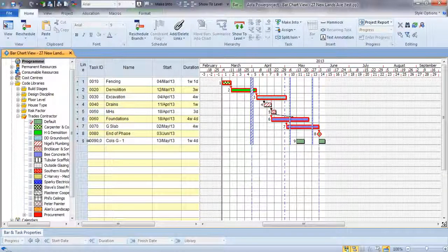They are different activities in their own right. They can have a different activity code, they can have a different resource and cost, they can have a different logical arrangement. They're not pseudo tasks in the same way they are in Microsoft Project. And the ability to do this helps us condense a lot of information at one time.